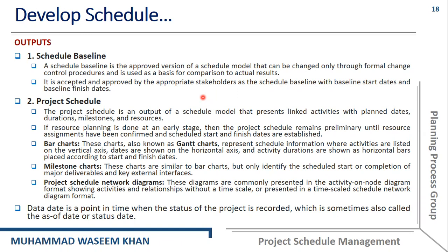Okay, so the schedule baseline is actually an approved version of the schedule model, and we can do changes in the schedule model through the formal change control procedures that we have discussed, I think, in the second or third chapter. Okay, the next one is the project schedule.